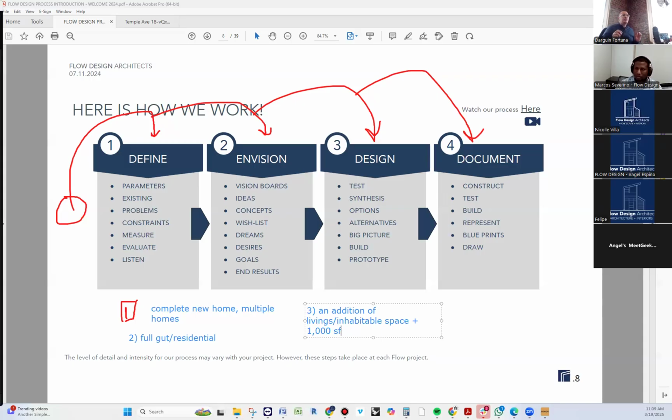So what you're going to see being done a lot is that they're going to be less than 1,000 square foot. A lot of the additions will try to be. We have one right now, Julio. I think that one's going to be triggered, but they're trying to be less than the 1,000 square foot. I put that on my contracts. Marcos may actually put that on his contract too. Like, hey, this is going to be less. This is going to be X. I have put it in bold, not to exceed 950 square feet or 980, because you don't want to cut it too close either. Okay.